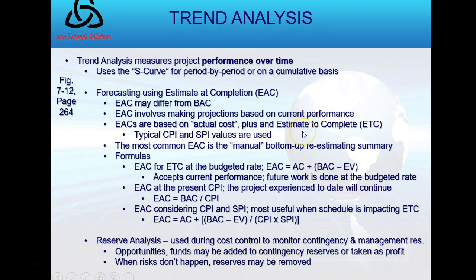Okay? And don't forget, in trend analysis, we have reserve analysis, which is used during cost control to monitor contingency and management reserves.